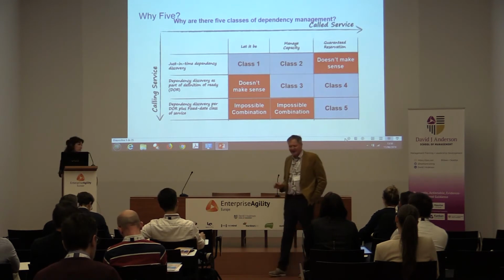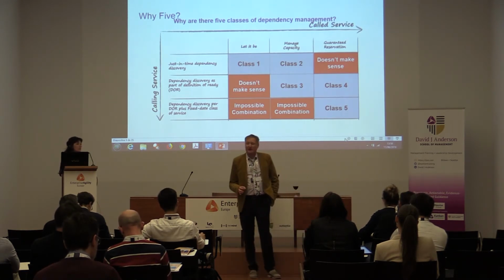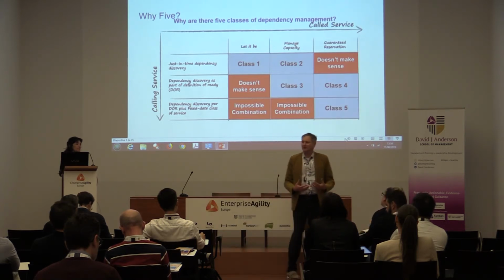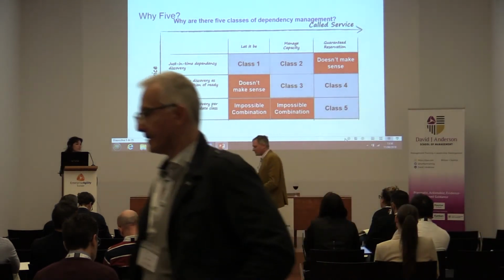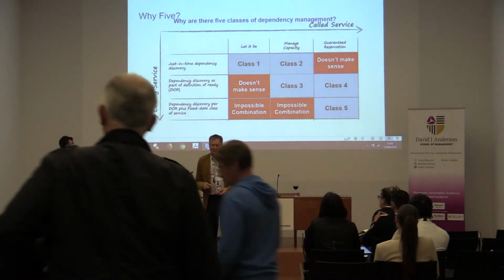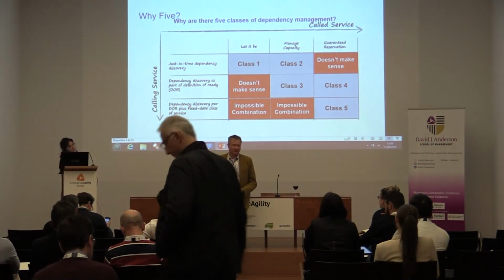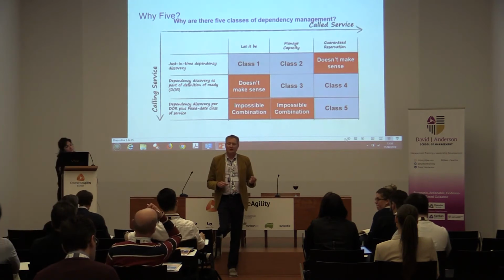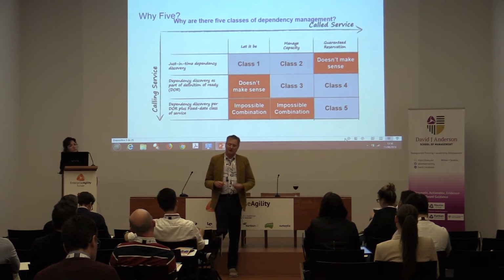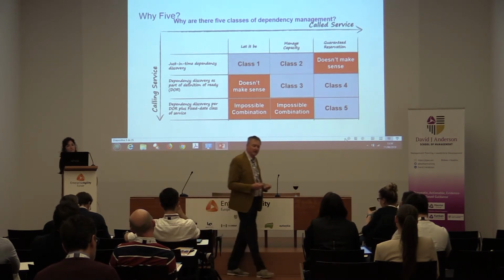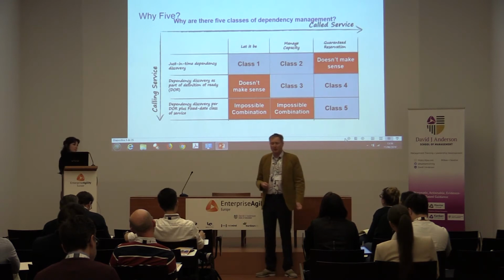Well, if something isn't that urgent, do you care whether it has a dependency or not? No, you do not. Why would you bother flying a whole bunch of people to Frankfurt to find out whether it did? Complete waste of time. So, in other words, whether you care about dependency management depends on the risks that you're trying to manage and primarily the cost of delay, the urgency of the item. If you don't understand the risks associated with the item, you can't manage the dependency appropriately.